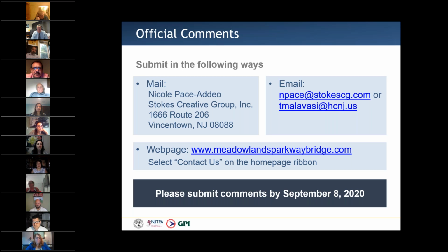With each ongoing biennial inspection, the inspections every 2 years, it is further deteriorating. So it does need to be replaced. With the CD work going into PE, we'll evaluate the alternatives to replace it or to rehab the bridge in place and not do a full replacement. So that'll all be worked on, but the structure is reaching the end of its useful life and it does need replacement.